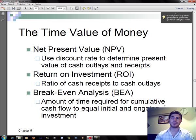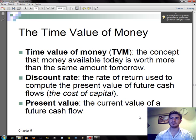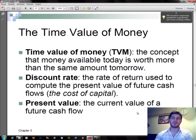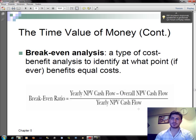Time value of money and financial analysis: Net present value uses a discount rate to determine the present value of cash outlays and receipts. Return on investment measures the rate of return on cash outlays. Break-even analysis — which is the most important part — determines the amount of time required for cumulative cash flow to equal the initial and ongoing investment. The time value of money is the concept that money available today is worth more than the same amount tomorrow. The discount rate is the rate of return used to compute the present value of future cash flows. Present value is the current value of a future cash flow. Net present value is a formula that calculates the time value of money, and break-even analysis also uses a formula.